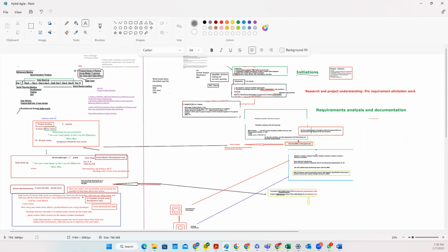Okay. So if you are a BA and you are not able to split the user story, and don't know if it is big or small with the acceptance criteria, that's okay too. Because in refinement, when the sizing happens, if it is a bigger size, then it will be split into two. Okay. And you just help the product owner keep splitting that user story, and then update both user stories that came from that parent story.